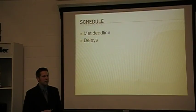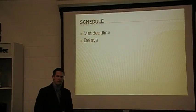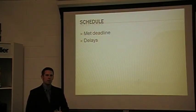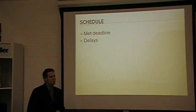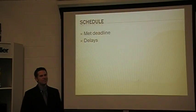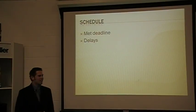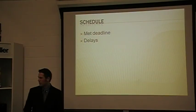We did have a few delays though, and that was probably my main thing that I learned, was trying to work around schedule. You have to be adaptive, you have to be able to change as the process goes along, because like Brad said, we had a part that took 3 weeks. You remember what you said, how long it was going to take you when I first asked you how long? Yeah, probably a couple days. So that was kind of a big hit. It made us work a little bit, but we adapted and changed.